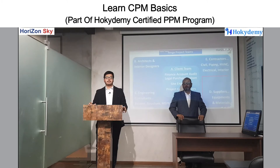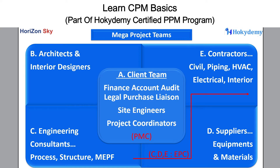In this module, we will be seeing the different types of teams involved in any kind of mega project. As you can see here, there are mainly five teams. The first one is the client team. Second will be the architects and interior designing team. Third will be our engineering design consultant, who will do the entire engineering design — HVAC, civil design, mechanical, electrical, and all that. Fourth will be our suppliers, who supply materials, equipment, and machinery. And finally, we will have the contractors, who execute our entire project — civil contractors, MEP contractor, HVAC, firefighting, electrical, and all those contractors.